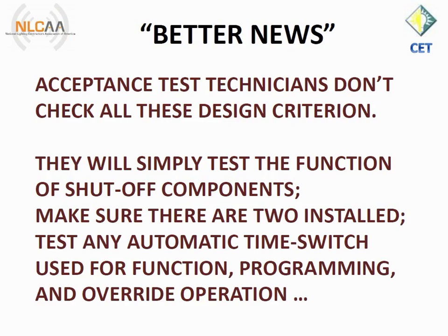Acceptance test technicians don't check all these design criteria. Okay, this is better news. They'll test the function of shutoff components. They'll make sure there are 2 installed in one of these stairways or corridors. They'll test any automatic time switch used for function, programming, and override operation. But they don't have a checklist to show